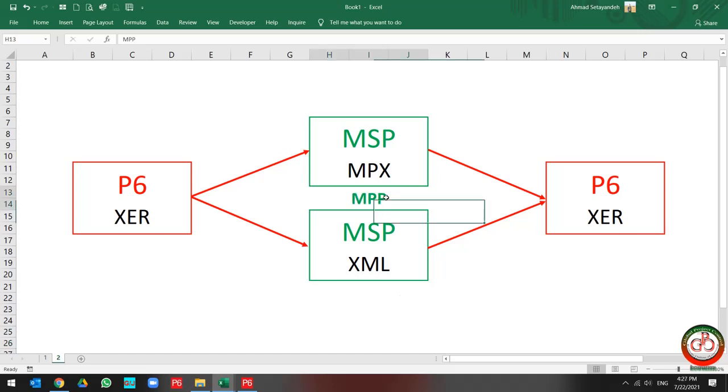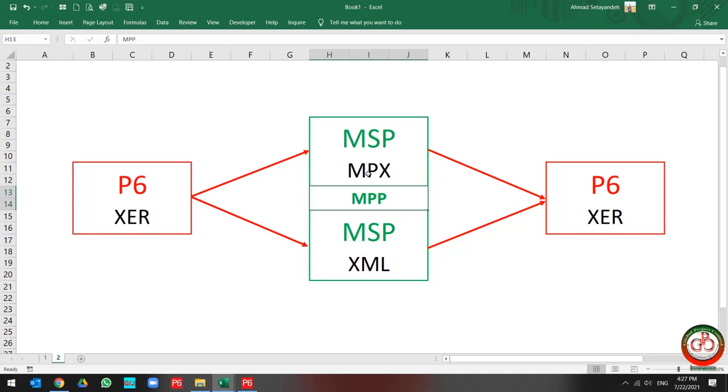When you want to change your MPP file to the Primavera P6 XER file, first you should save it to the MPX or XML format. XML format is available format by Microsoft Project directly, but for MPX after Microsoft Project 2000 version, you need to change the MPP to MPX by converter. I am going to describe you both of these solutions.